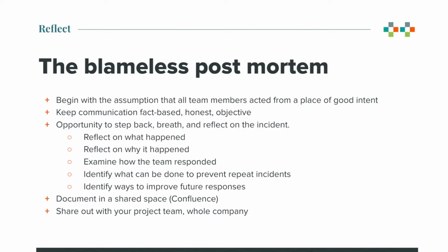A blameless post-mortem provides the team with an opportunity to stop, to breathe, and reflect on the incident. It's an opportunity to identify what went well, what worked well. They'll talk about things that didn't go as smoothly, and then things that the team wants to improve. It's likely that you'll need a full hour for this session, and you'll definitely want to have someone take notes. Sometimes, depending on the magnitude of the incident, you may need 2 hours.